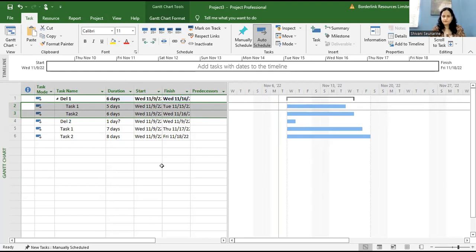Yeah. We put in the durations and we do the links between the tasks, because if one is finished, that's the start for the next. So you put it as finish to start, right? Or it could also be start to start. Yeah. So I'm going to highlight now